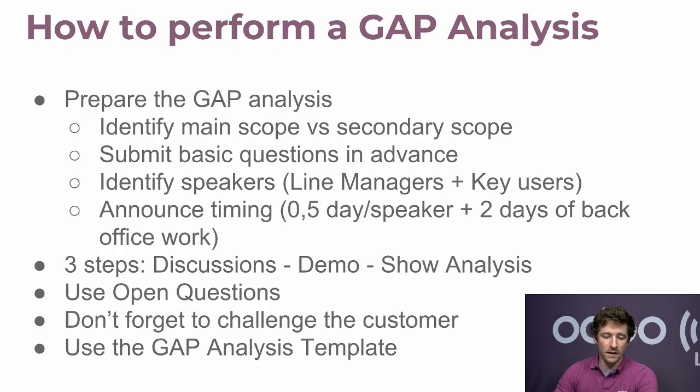You can announce the timing of the gap analysis, and budget it to your client by saying that it is in general 0.5 day per person interviewed, and you will also need 2 additional days for the back office work, when you come back to your office and do all the analysis and prepare the results for your clients.